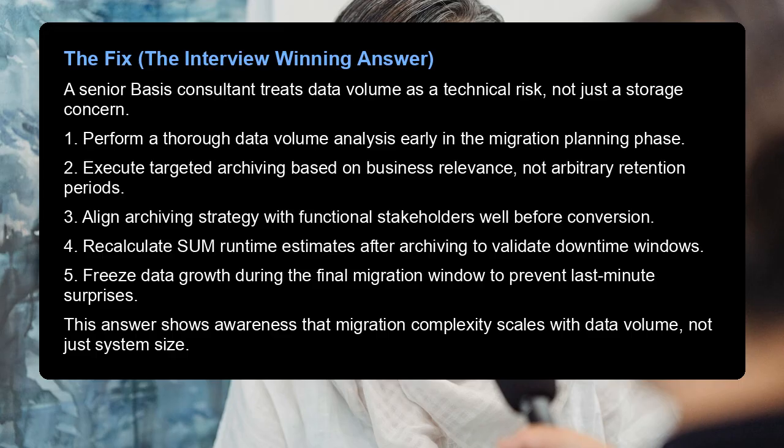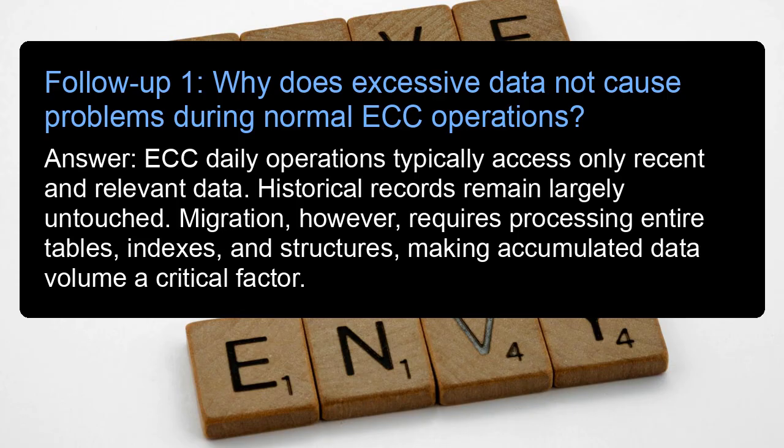5. Freeze data growth during the final migration window to prevent last-minute surprises. This answer shows awareness that migration complexity scales with data volume, not just system size. Follow-up 1: Why does excessive data not cause problems during normal ECC operations?